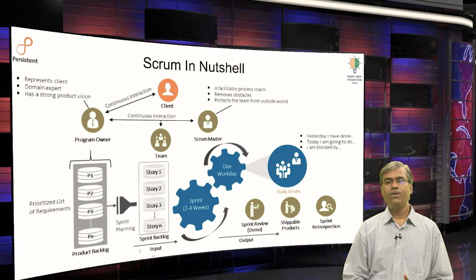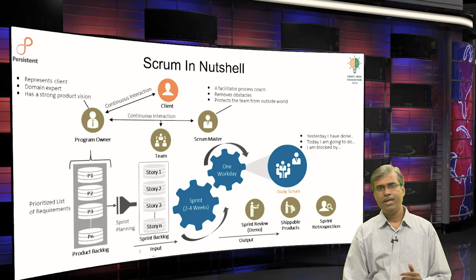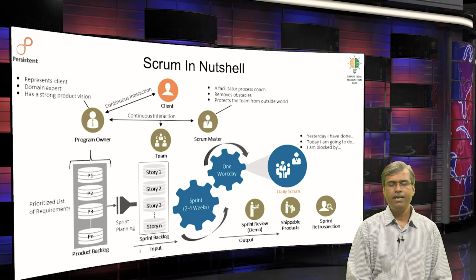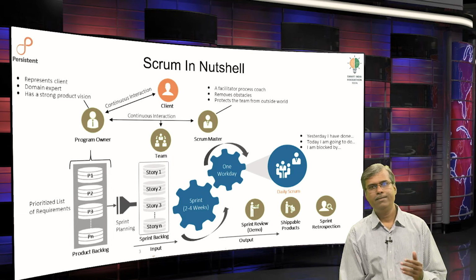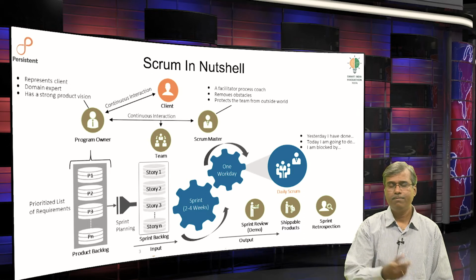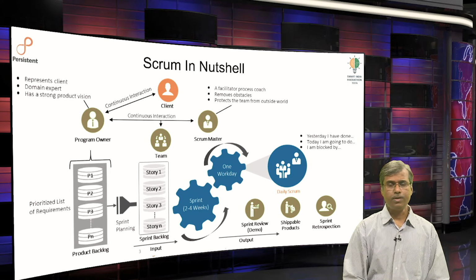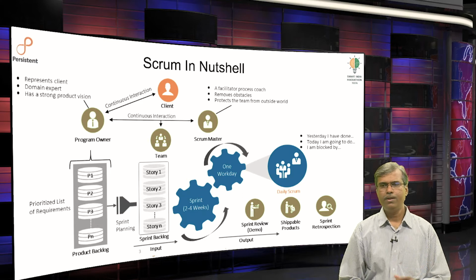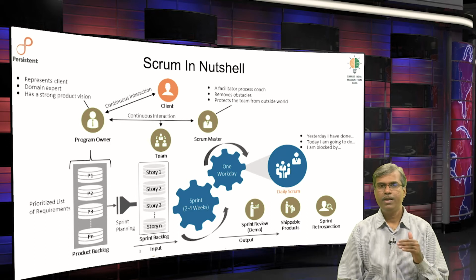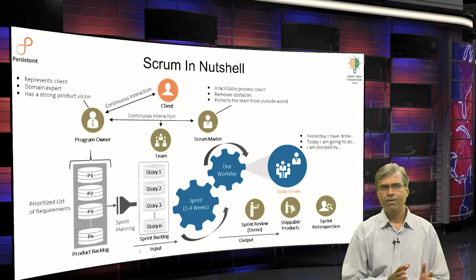How do you know which one to go first? Simple, the prioritization, isn't it? Each atom in the backlog has a defined priority, priority 1, 2, 3 and so forth. Similarly, at the sprint backlog level, you have priority defined as priority 1, 2, 3. Which one would the team pick up? Absolutely, it is priority 1 stories and then second and third and so forth. So, it is very straightforward for the team to work upon the ones that are important, and the priority comes from the customer and the product owner. They know what they want first, and then the team simply picks up the stories from the backlog.